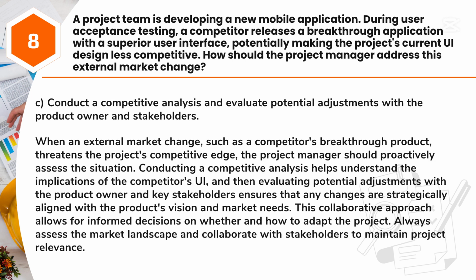Answer: C. Conduct a competitive analysis and evaluate potential adjustments with the product owner and stakeholders. When an external market change, such as a competitor's breakthrough product, threatens the project's competitive edge, the project manager should proactively assess the situation. Conducting a competitive analysis helps understand the implications of the competitor's UI, and then evaluating potential